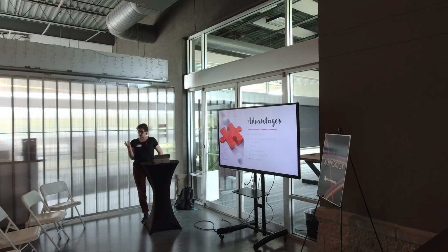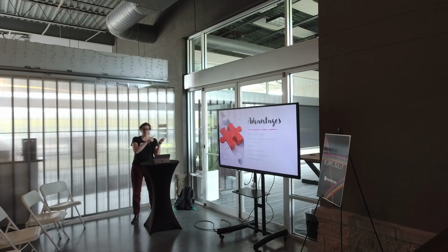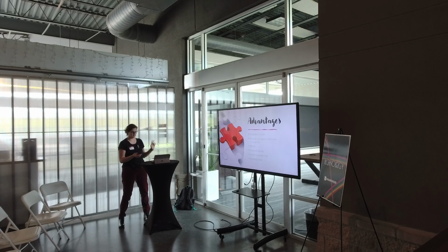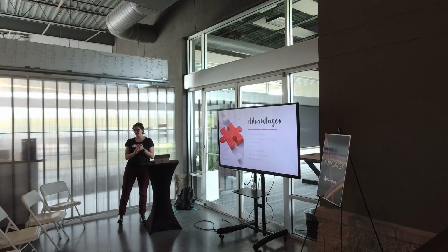Or the other thing is the way we've set up our workflow is that you could set up all your test cases, like verify XYZ, so forth and so on, all the test cases that you would be testing on your issue. And you can either approve or mark it as failing and then send it back. And so the advantage of that, and maybe this is how everybody does this already anyway, so just listen to me blather on, is that each bug has its own subtask, so it doesn't get lost.